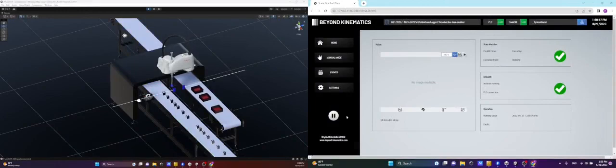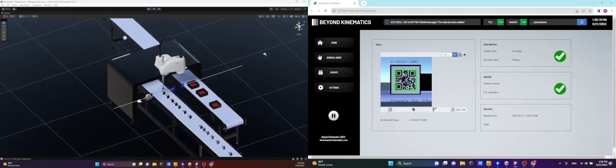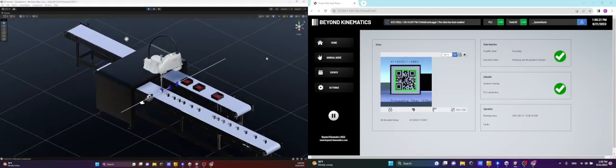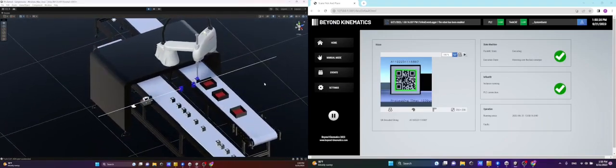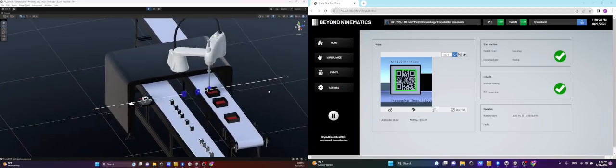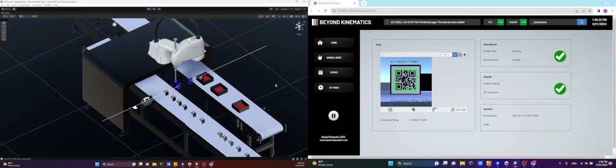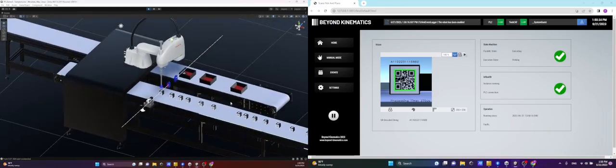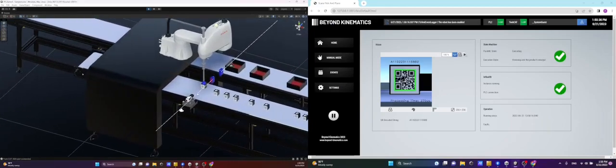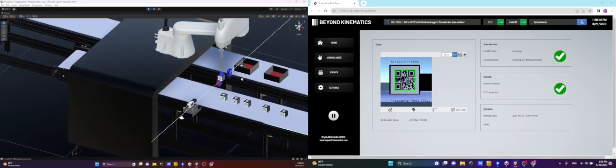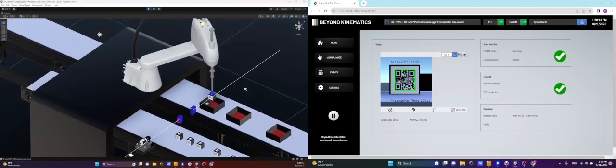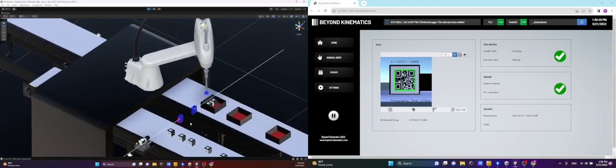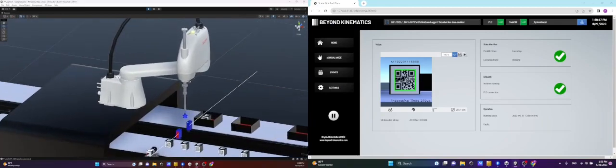We have prepared a video to demonstrate how the use of simulations and digital twins can provide tremendous value for real-time code development. In a typical machine commissioning lifecycle, control software development is very dependent on physical hardware, mechanical assembly, electrical wiring, and lead times of physical components. Components need to be ordered, received, and then installed and integrated into the overall system. Unfortunately, with this approach, delays in the procurement, design, and assembly process translate into a highly shortened controls development timeline.